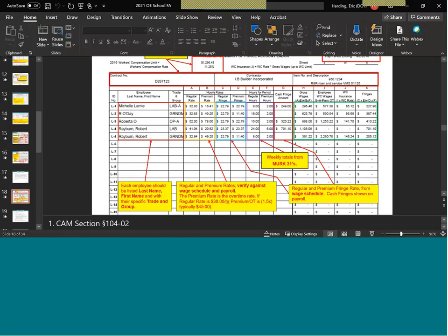From the payrolls, you should be verifying the wage rate and scale against the payrolls. You should be checking those. If you're doing your due diligence, when a force account comes up, you'll have the contractor and you will have a good handle. You're doing your wage rate interviews, you're checking them against payroll. When the force account starts, there should be no hiccup.